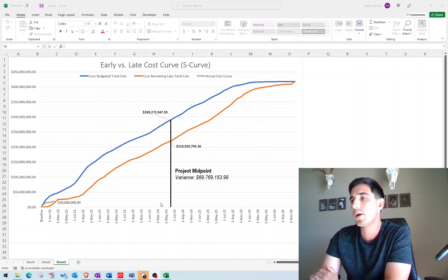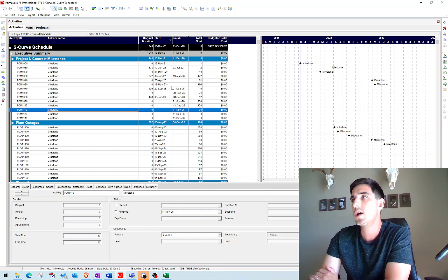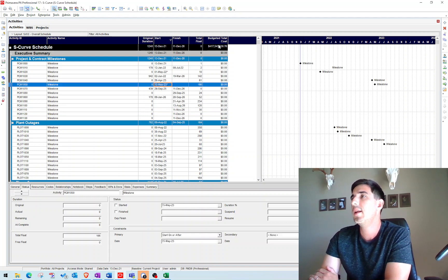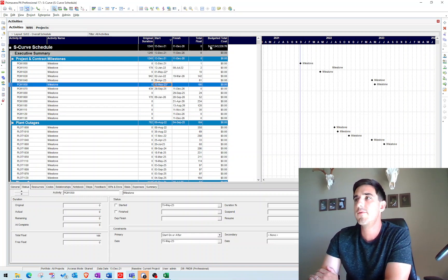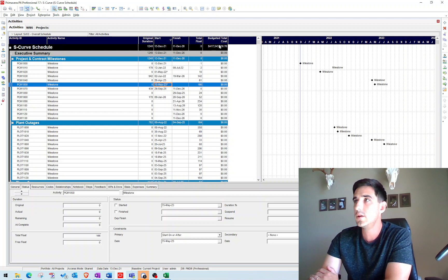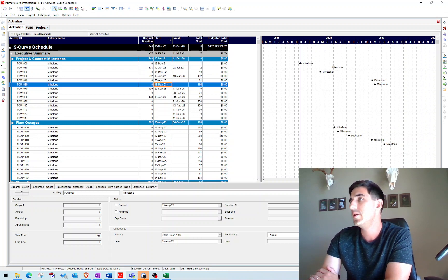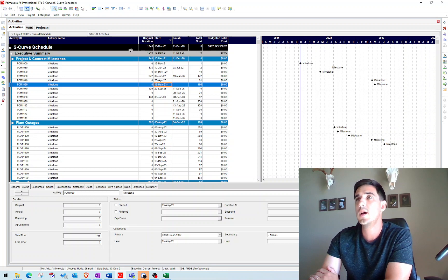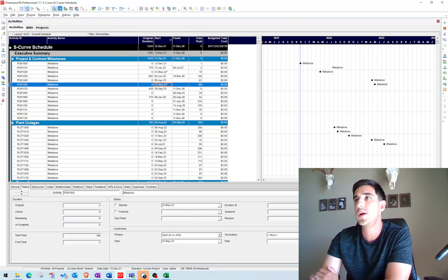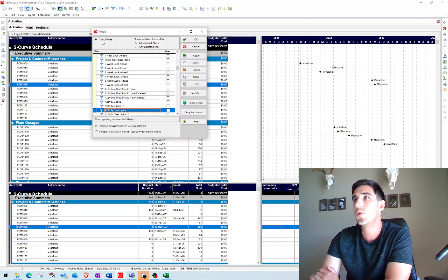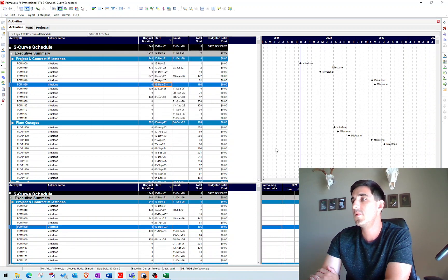So that is what we're going to generate today. I have this cost-loaded schedule here, and you can see we have $417 million. It's a huge number, a big project. And so the way that we're going to generate this cost curve is we need to go to our activity usage spreadsheet. Make sure that you're filtered for all of your activities before you start.